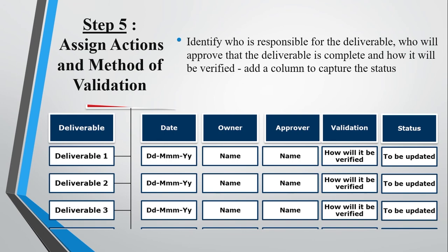And we now look at the status and understand, have we got green? Are we amber? Or are we red? I'm not going to tell you the color coding, but effectively, you are going to use that sort of color coding philosophy that gives you an understanding of where you are. Now you can be amber because you've achieved a certain level or percentage in terms of delivery, and you're not near the actual deadline date right now, so you could constantly be running amber. If you've not achieved any tangible progress and you're at a very close period towards the delivery date and nothing tangible is coming, these elements are flagged red, and these then take a priority in the conversation with the team to understand what needs to be done in a timely manner.